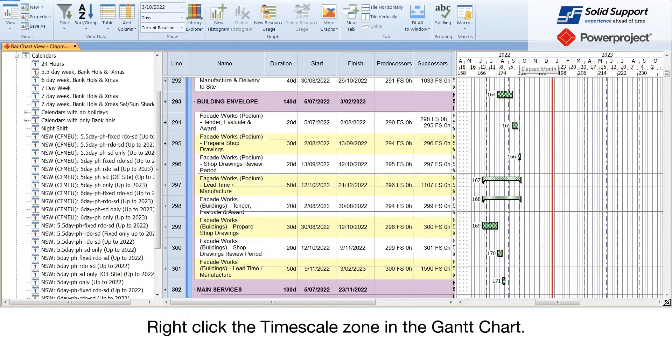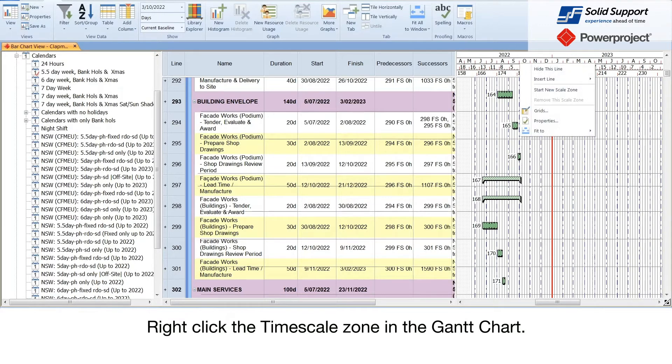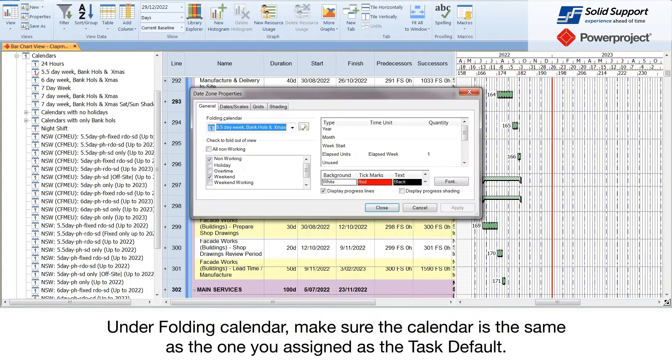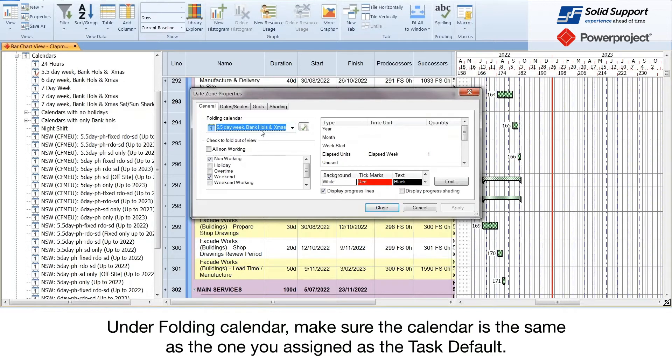Right click on the timescale zone in the Gantt chart. Select the properties command icon from the dialog box. Under folding calendar, make sure the calendar is the same as the one you assigned as the task default.